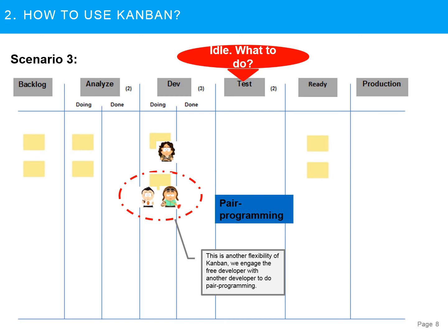If this is the case, maybe we can pair him or them up with one of the developers, or maybe they can pair up with the analyzers, or maybe they can write some automation or deployment scripts. And if none of it can work, you need to think what else can they do so we can make these testers valuable to the team. It could be retraining, updating documentation, and so forth.